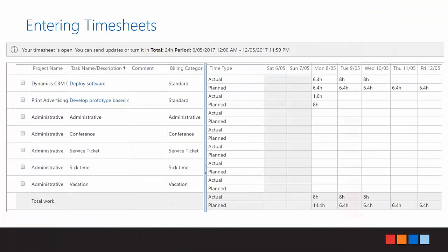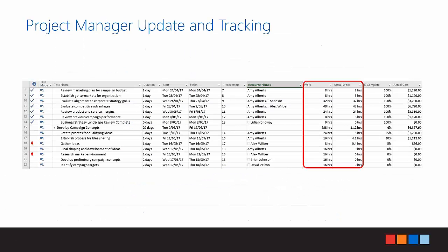And then finally, after tasks, Lydia, as the project manager, she could do these updates. She could either sit down with him and do the updates, or during a scheduled project meeting, we could update all of the different tasks. So you can see here I've highlighted the different tasks. Line number 18 and line number 20 are the ones that David was working on. You could simply put in David has worked on this particular task all last week, which would be 40 hours. You could type that information in there and put a % complete.